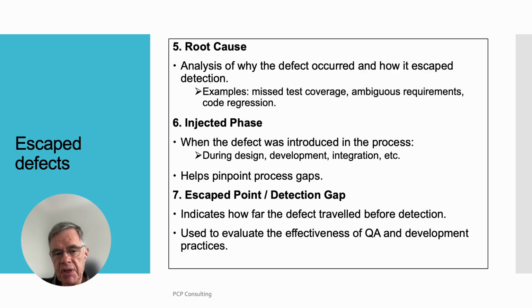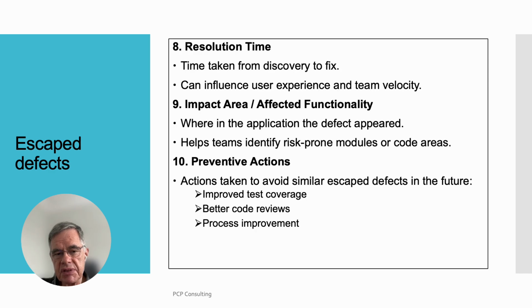Injected phase, when the defect was introduced in the process, during design, development, integration, etc. Helps pinpoint process gaps. Escape point, detection gap, indicates how far the defect traveled before detection. Used to evaluate the effectiveness of QA and development practices. Resolution time, time taken from discovery to fix, can influence user experience and team velocity.